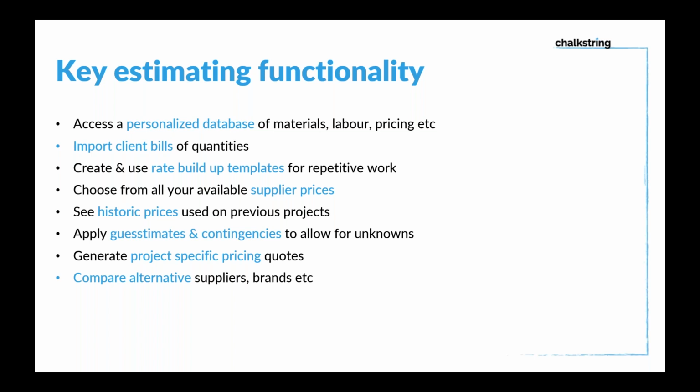And ultimately, once you've gone through the estimate and prepared it, it's about then producing documentation. So producing a tender with all the information in it, which you can submit to your client, very clearly laying out all the information, all the rates, all the quantities, etc. And also, early on, even pre-contract, you've got a material bill and a labour bill with a complete breakdown of all the materials you will need for the project and all the labour you will need for the project, all laid out across different zones if you've set up different zones.